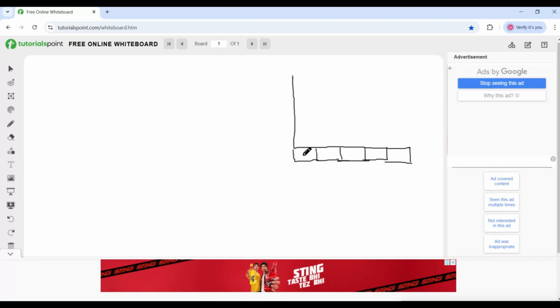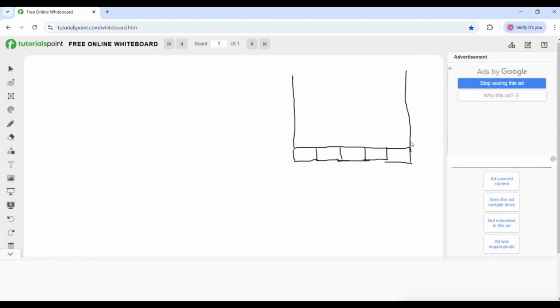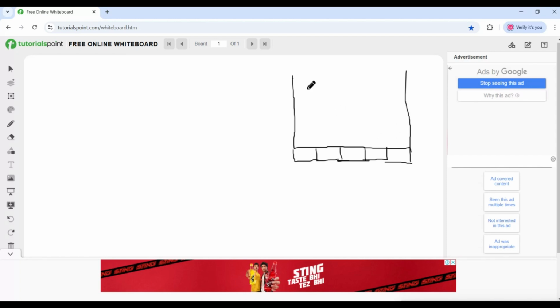And as I said, each deliverable is of 10 days and $600. And this is our BAC, budget at completion. So the PV curve would be like this.